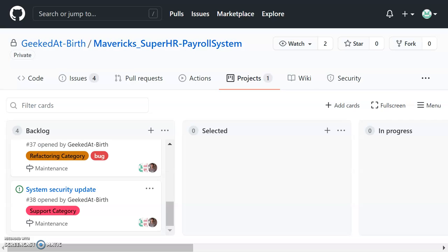Would we use something similar again? I'd say yes, but not for keeping track of issues. We found it faster and easier to communicate directly through chat about issues we're having, as compared to documenting issues here on the Kanban board. What worked? The project planning and task assigning worked perfectly with the Kanban board. Issue tracking didn't work.